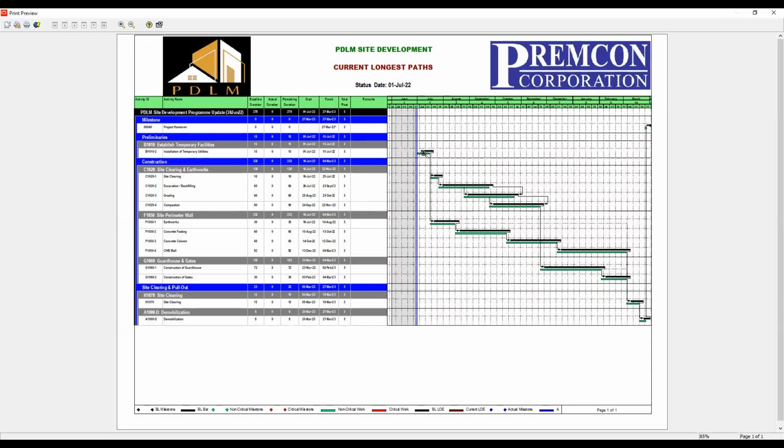So we can see here there are two networks of activities that connect. These are the plotted paths from here down to here, going here and then moving to the project milestone. And the other one is from here, going down here, and then down here, moving here, and then to the project milestone. Okay. If you look at our total float here, that is 5, meaning we are ahead by 5 days. So this longest path is not really critical.